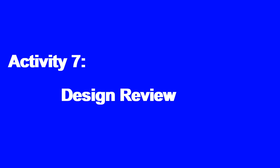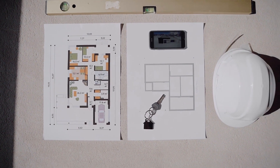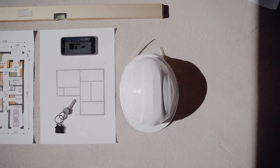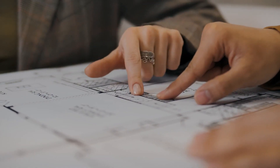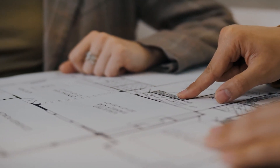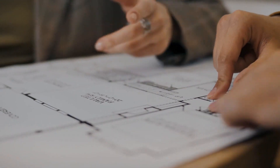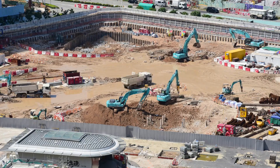Activity number seven: design review. Once you are equipped with the necessary drawings and specifications of your project, a senior draftsman or architect needs to review the design. As an experienced contractor, you will then present the important findings and your proposed solutions to the consultant's office for final decision.